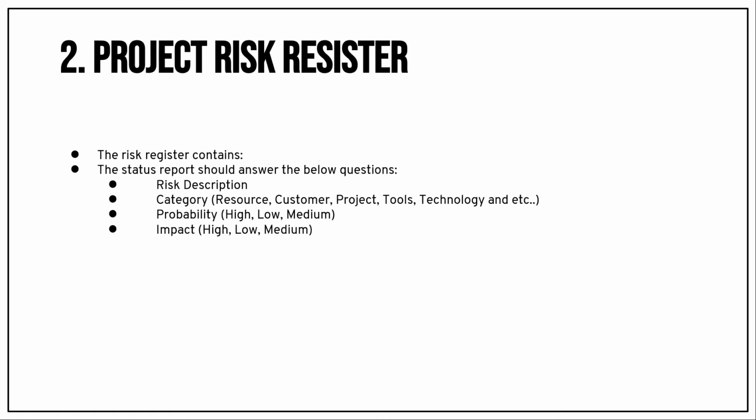But if a developer is going on leave for a month due to some personal reason, the impact will be low. We can replace the developer with some other developer with a small transition plan. But when the architect or lead is going on leave for a long period, that will have a major impact on the project.